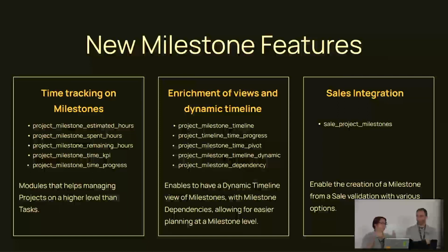So when you change the date of one stage, and you have a second stage that depends on it, the date will change as you change the first one. So you can keep your planning right like you planned it at the beginning. So this is for the timeline and the new views.